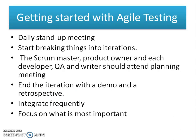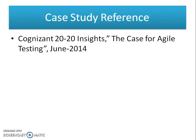Regarding how Cognizant implemented Agile testing: they started with daily stand-up meetings and began breaking work into iterations. The scrum master, product owner, and each developer, QA, and writer should attend planning meetings. They incorporated iteration demos and retrospectives, integrated continuously, and focused on what is important. This case study was referenced from Cognizant's 2020 Insights: The Case for Agile Testing.